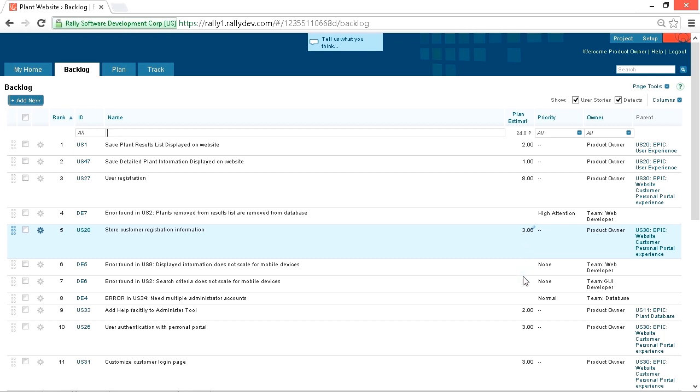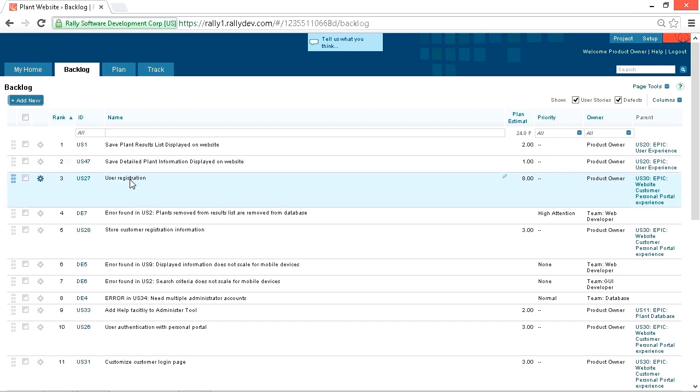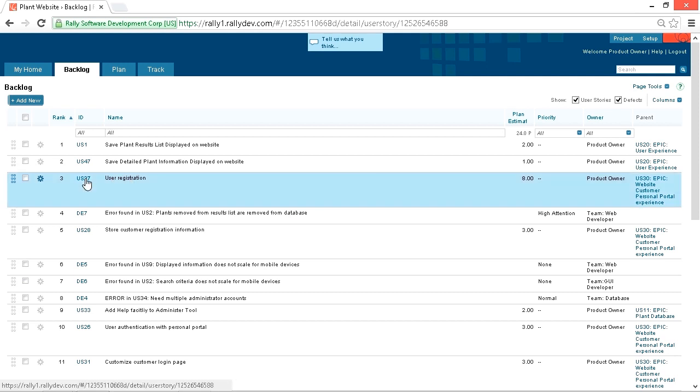Three is a little bit larger, medium size, 2, 3. But then we have this one that's 8. That's very large. That's the user registration user story. Since it's so large relative to the other user stories, let's take a look at it and see what's going on.